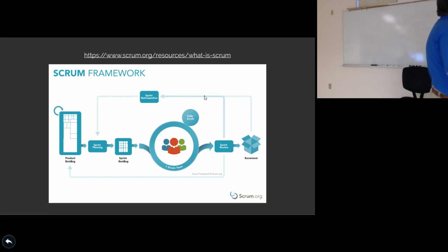Again, a sprint's kind of time boxed. You'll see there's a few other things in here. So there's a product backlog. That's the features or the work items that the business wants done. Usually we try to prioritize this as much as we can from highest priority to lowest. And then you also have in here the sprint backlog. Those are the items that we've decided that we're going to work on in this sprint. Make sense? So this is all the items that we want ever. This is pie in the sky. And this is what we're actually going to work on in this week or two period.